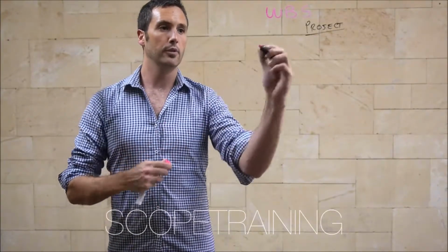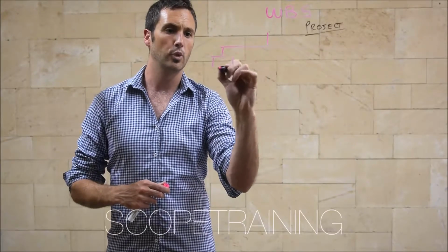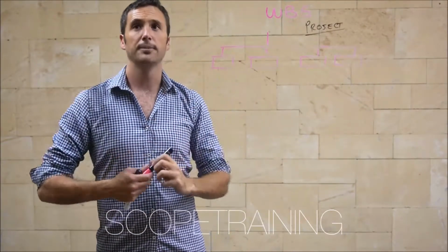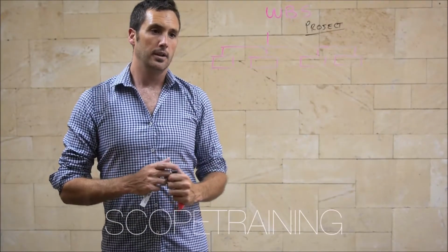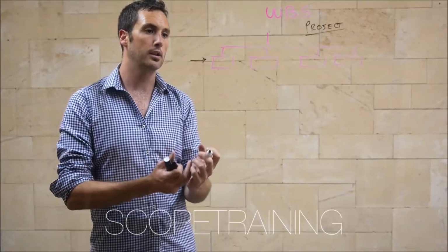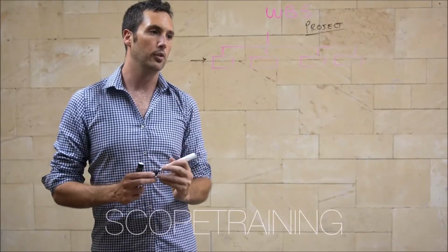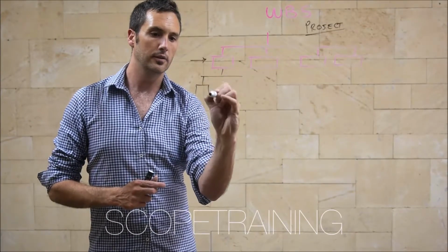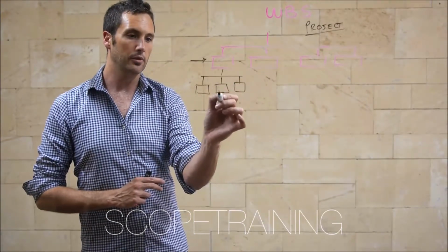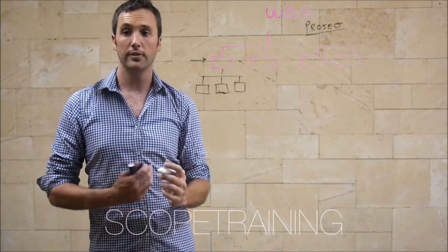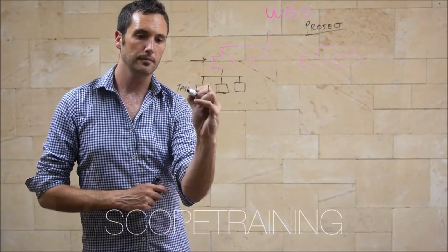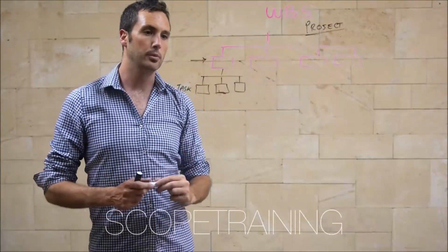So work breakdown structures have two types, or two forms of elements. They have tasks and they have summaries. And at a high level, you've got the second one, the summary, the category, the work package, whatever you want to call it, but this box houses all the tasks. And then, as soon as you start increasing the detail, you find things emerge. And anything at the lowest level becomes a task. So if you can roll it up to something, that's a category, a summary, a work package. If there's nothing below it, that becomes a task.